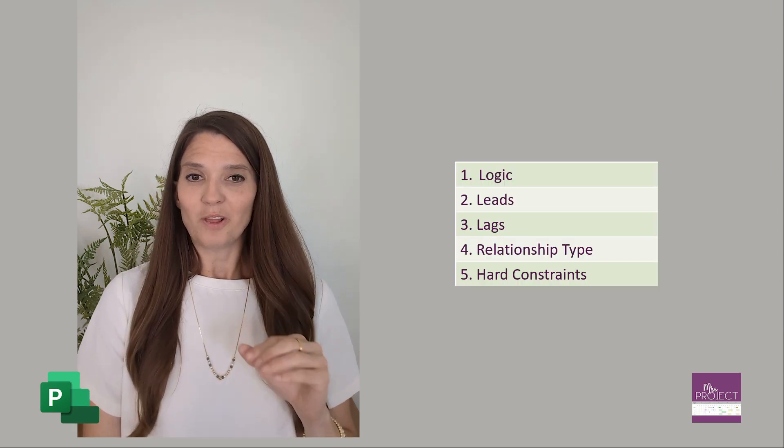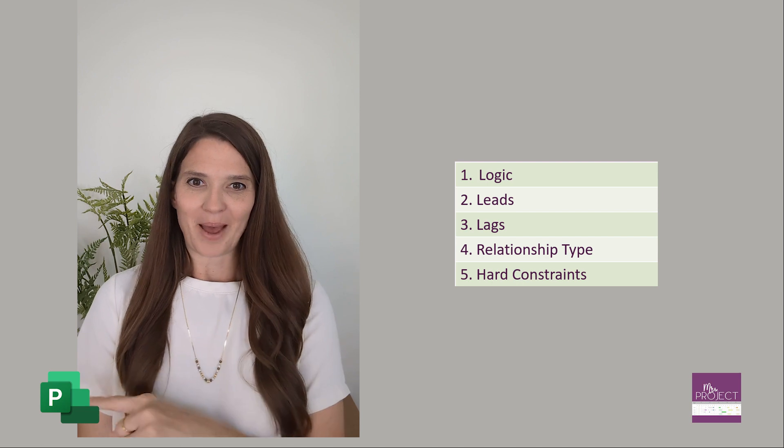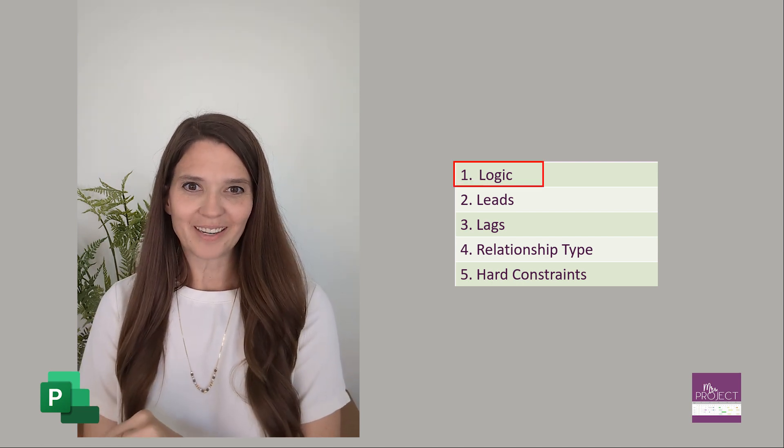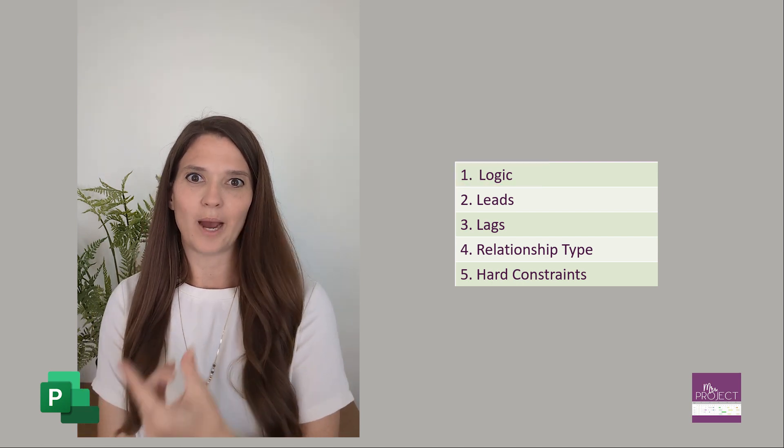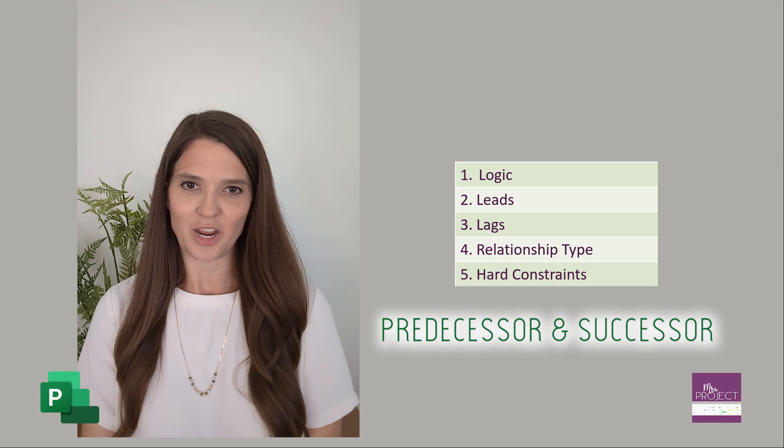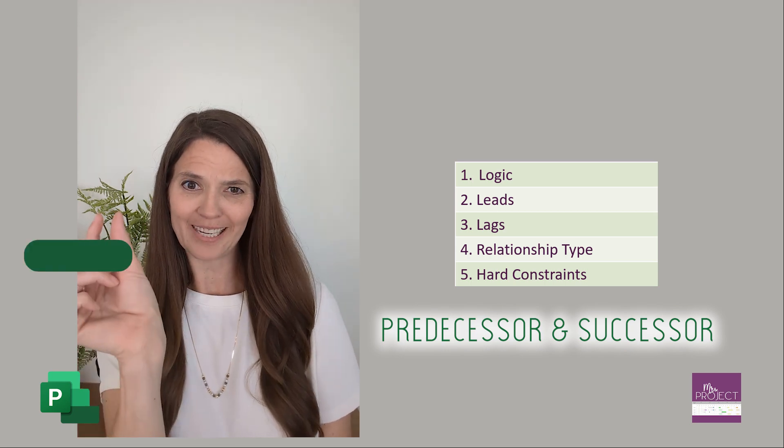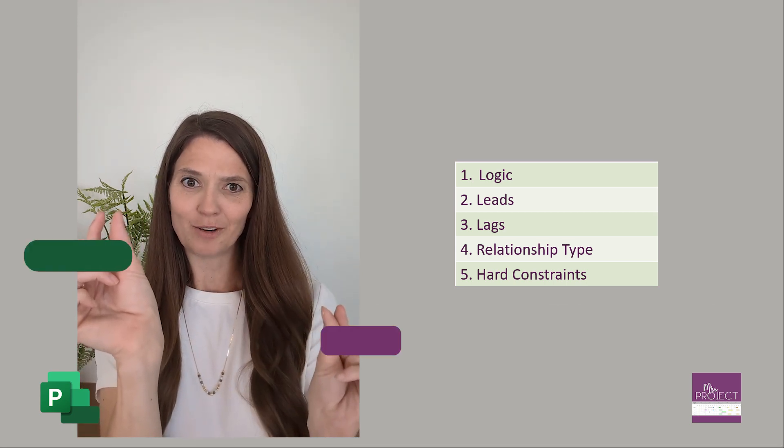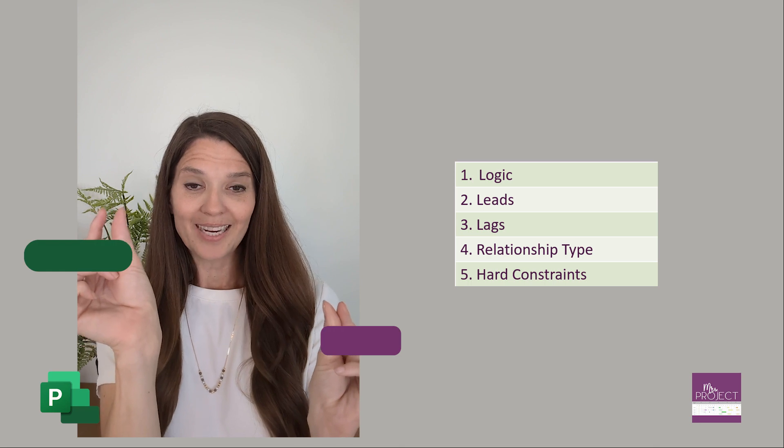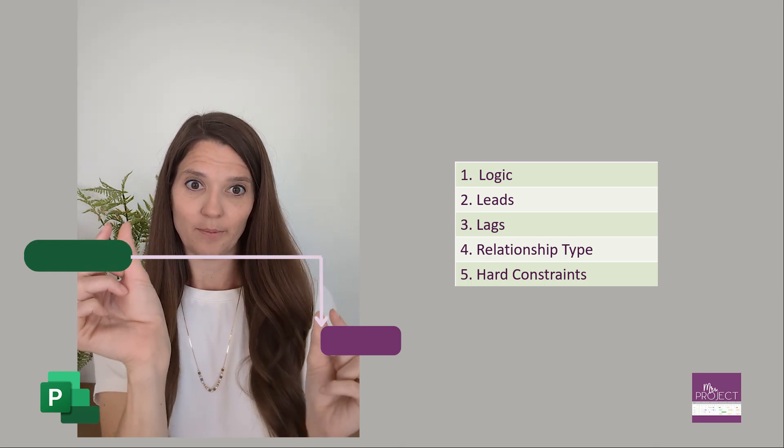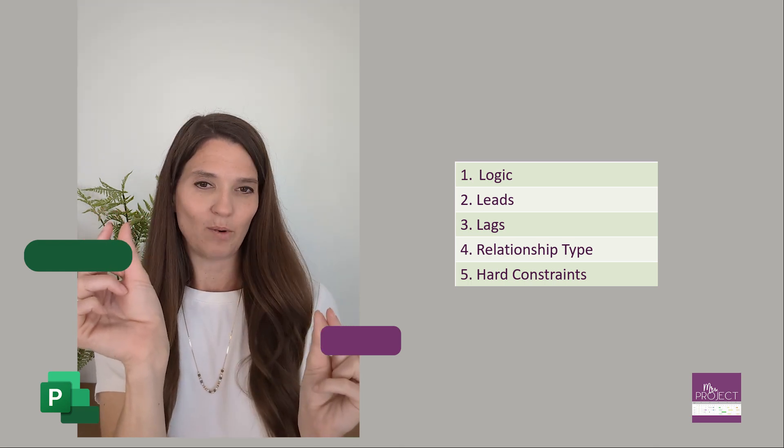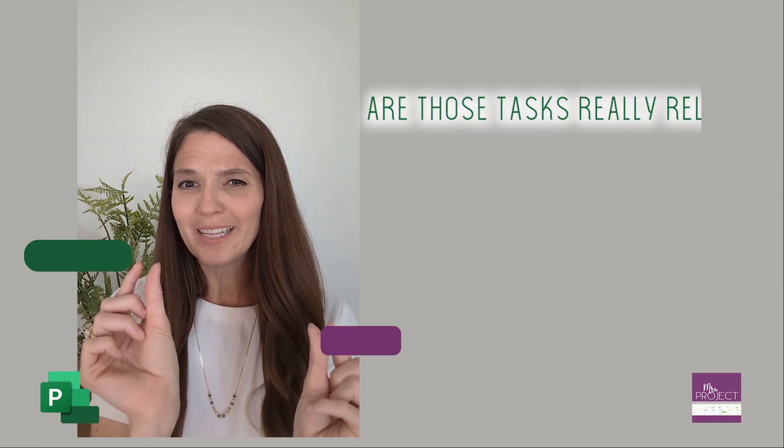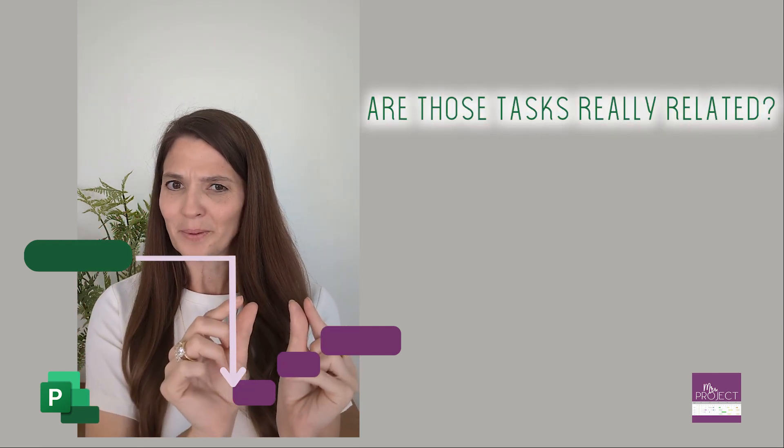The reason why DCMA checks this is because if you're linking just so that you can bypass the logic metric that says you have to have a predecessor and successor, and you link something way over here to something way over here because you don't know what else it links to, it's gonna say that there's a lot of slack in there because you don't know what's going on. So it's questioning: are those tasks really related or is there something else in the middle?